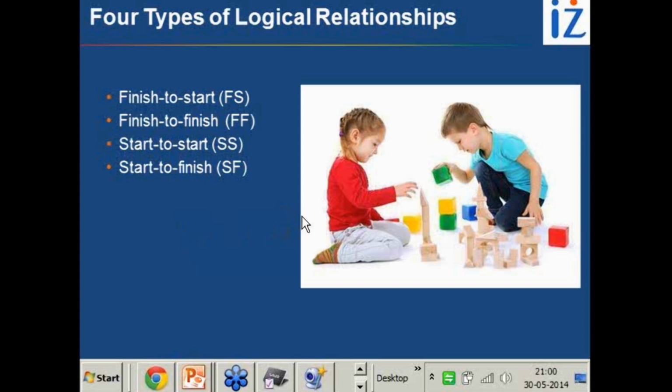So Joseph, this is all about the estimate activity duration process of time management, where you calculate the duration on the basis of a 3-point estimate, on the basis of some logic, or a parametric estimate. You calculate the duration. In an exam, you will get the duration of activities, but that drives the duration of an activity. What drives the logical relationship? The business rules, the industry rules, the engineering practices, and the resource constraints drive the relationship rules. So that is how you make it.